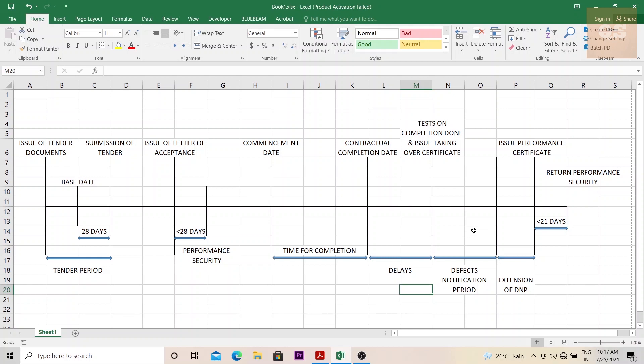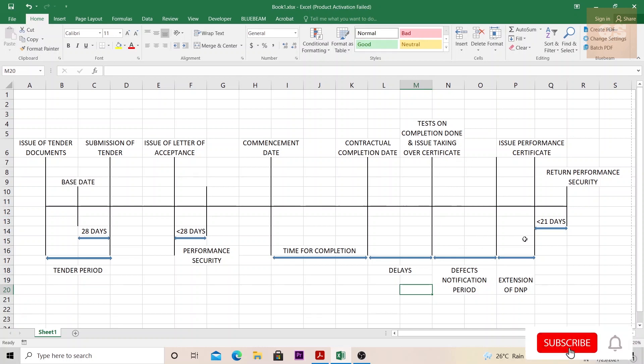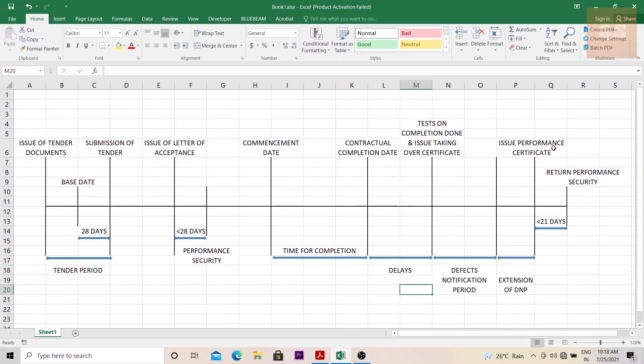This period is also mentioned during the contract signing. Usually it is for one year and it can also be extended. Within this period, all the defects and incomplete works need to be finished off. Once that is done, finally, a performance certificate is issued to the contractor by the employer. This is the final certificate of completion. And once this is received, within 21 days, the performance security that was initially submitted needs to be returned back to the contractor by the employer.